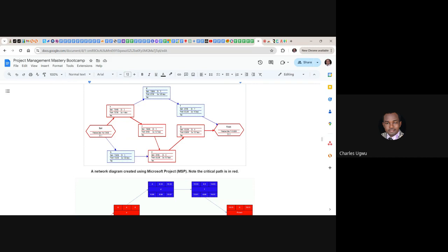Are they going on maternity leave? Or are they going on paternity leave? Or any vacation? You must ask so many questions to make sure that they are going to be available. If they are not going to be available, then you must look for their replacement immediately, even before this project is starting. This is what we call mitigation, because somebody must be available.